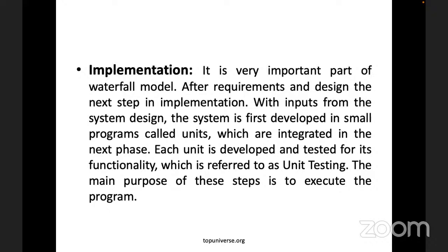Now, in this stage, a very important part of the waterfall model, after the requirements and the design, the next step is implementation with inputs from the system design. The system is first developed in small programs called units, which are integrated in the next phase. Once the design is complete, the technical implementation starts, and this might be the shortest phase of the waterfall process